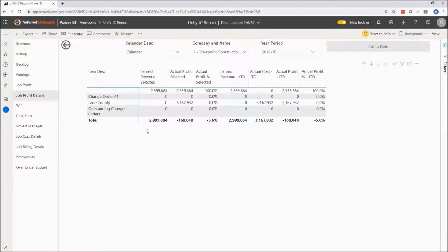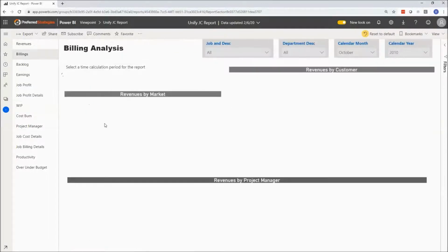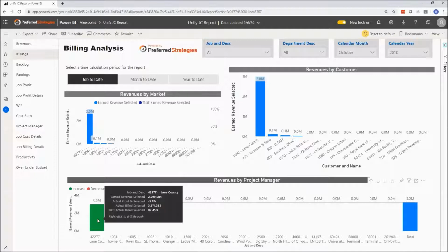Frank hinted at this, and I'll emphasize that. We're building these reports, these data sets, on the transactional data system. So in job costs, it's the cost detail table and the cost billing detail table. Those are unioned together, and we have a single fact table, and I can then drill through to the detail data in the same report. So the idea is that I don't need to go run something else somewhere else to look into the why. Why am I over budget?